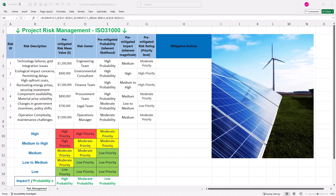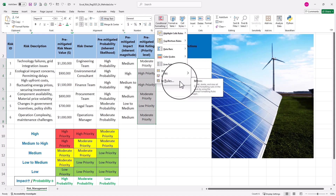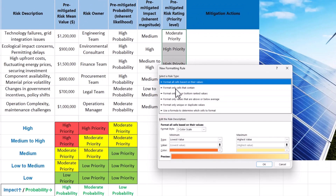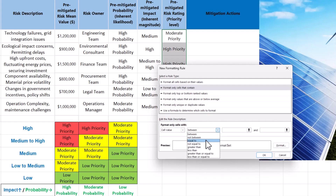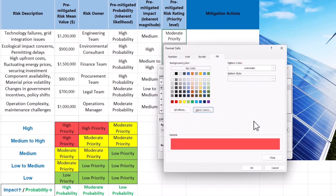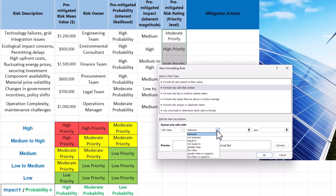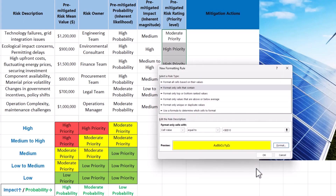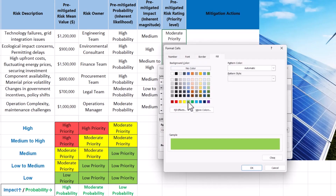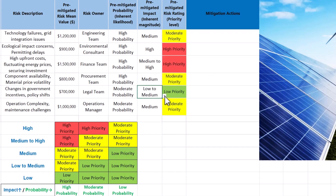Back to our template — to complete step 2, we should color code the priorities similar to the theme provided in the risk matrix. We can do this using conditional formatting. Choose all risk ratings, navigate to the Home tab, and select Manage Rules under Conditional Formatting. Define a new rule for cells that contain a value equal to high priority, and choose a shade of red as the fill color. Generate additional rules for moderate priority with yellow, and low priority with green. The color coding is applied and the risk priorities are now fully animated. If a new risk is added or likelihood and impact values change, the whole sheet updates dynamically.